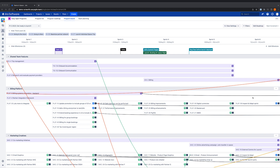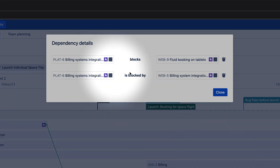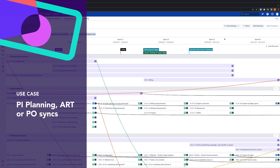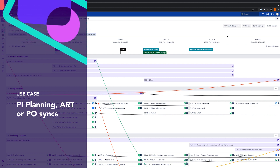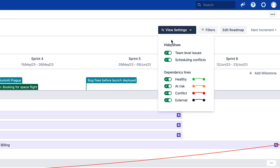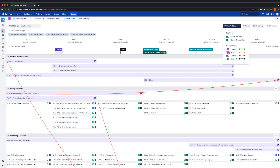If work is at risk, Easy Agile Programs helps to surface that information so that teams can be unblocked. To find out more about our dependencies, we can click the icon on the dependency line. Here we can see the dependent issues and we also have the option to delete the dependency. If we want to focus our conversations during PI planning or throughout execution during ART or coach syncs, we can easily filter to see only the dependencies we need to troubleshoot. Under the view settings menu, we can toggle on or off the dependencies we'd like to see on the program board, allowing you to easily isolate at-risk or conflict dependencies by hiding healthy dependencies from view.